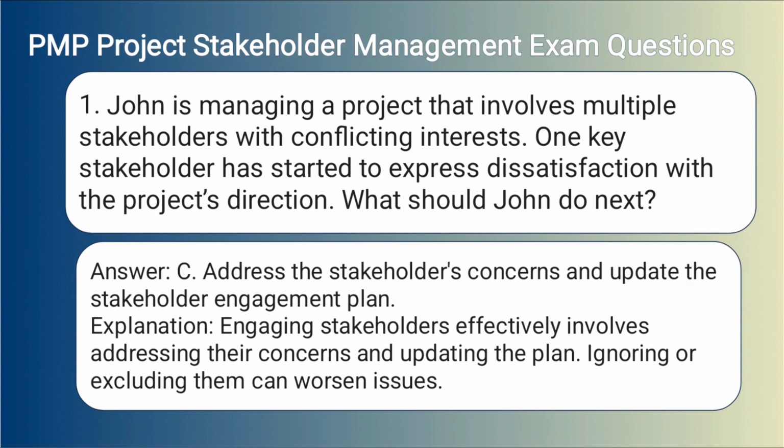Answer: C. Address the stakeholder's concerns and update the stakeholder engagement plan. Explanation: Engaging stakeholders effectively involves addressing their concerns and updating the plan. Ignoring or excluding them can worsen issues.